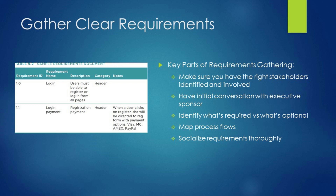During these conversations, document the functional versus the non-functional requirements, and also which requirements are required versus which requirements would be nice to have. After you reach a point where you're comfortable you have a solid start at building the requirements, schedule sessions with the larger team to review the requirements and make sure everything is accounted for. Additionally, to flesh out your gathered requirements further, maybe try conducting a brainstorming session or mapping the process flow as a check and balance.